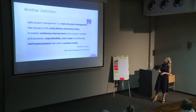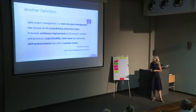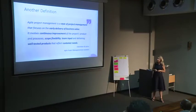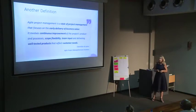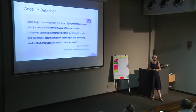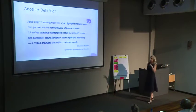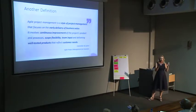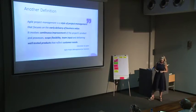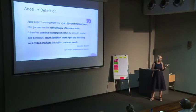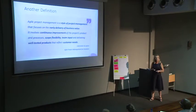Agile project management is a style of project management that focuses on early delivery of business value. It involves continuous improvement of the project's product and processes, scope flexibility, team input, and delivering well-tested products that reflect customer needs. Early delivery means: what are the features the customer wants now — let's do it in the next two weeks and roll it out. Continuous improvement means every two weeks we sit and say what can we learn from the past sprint and how can we do things differently.